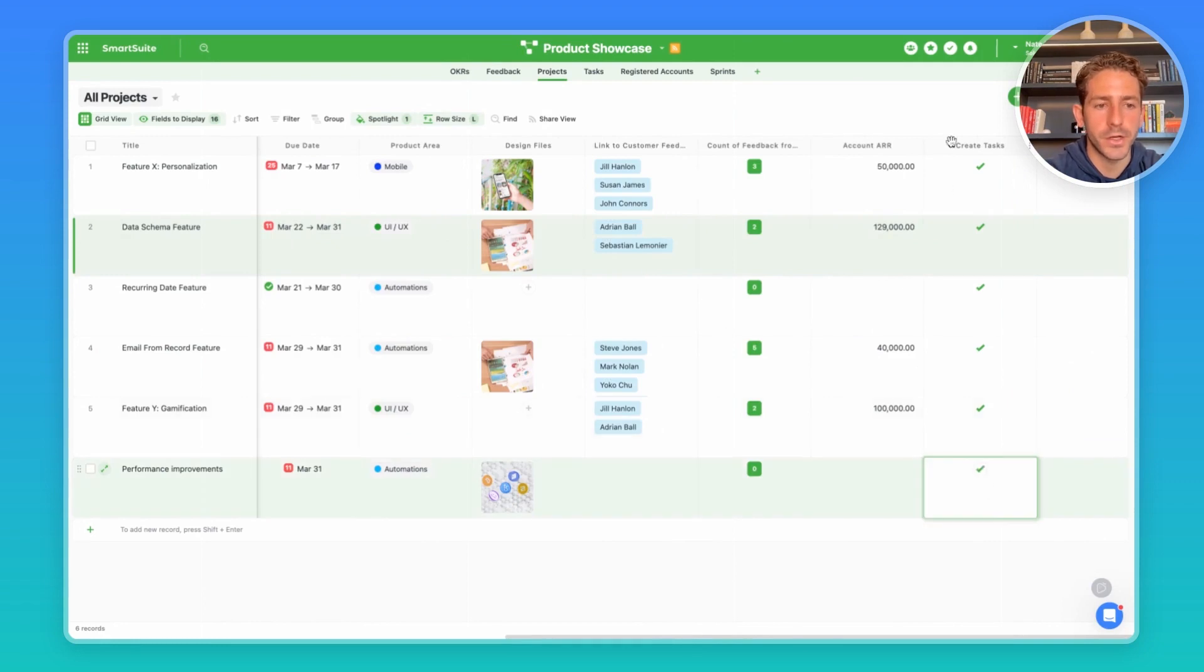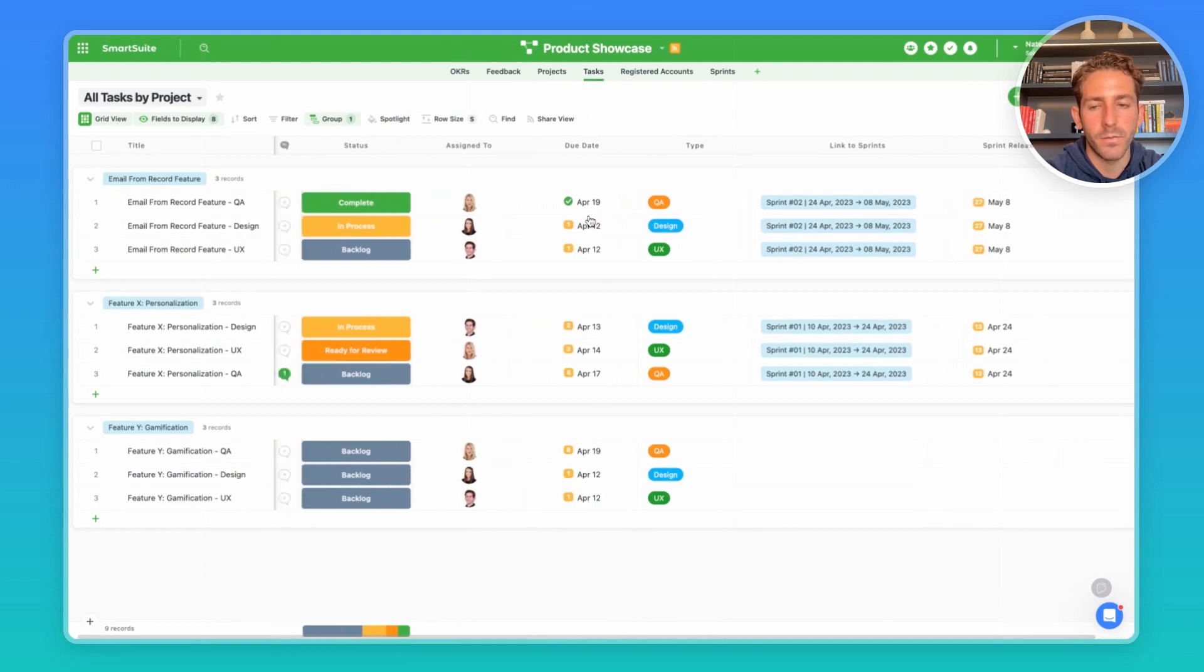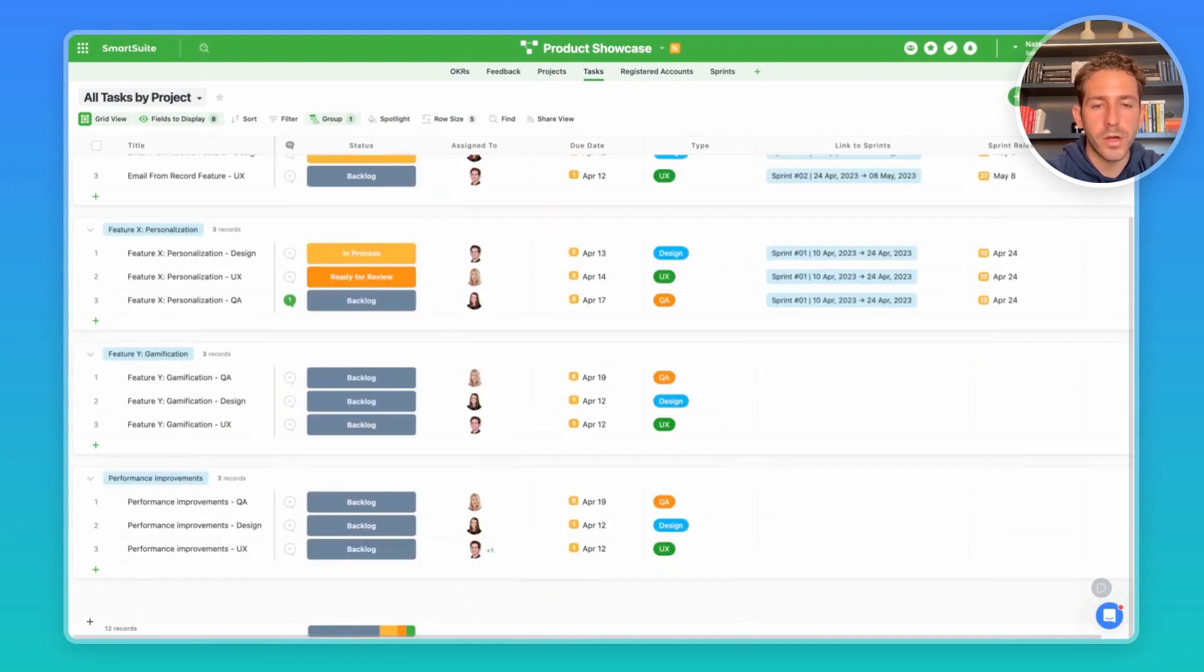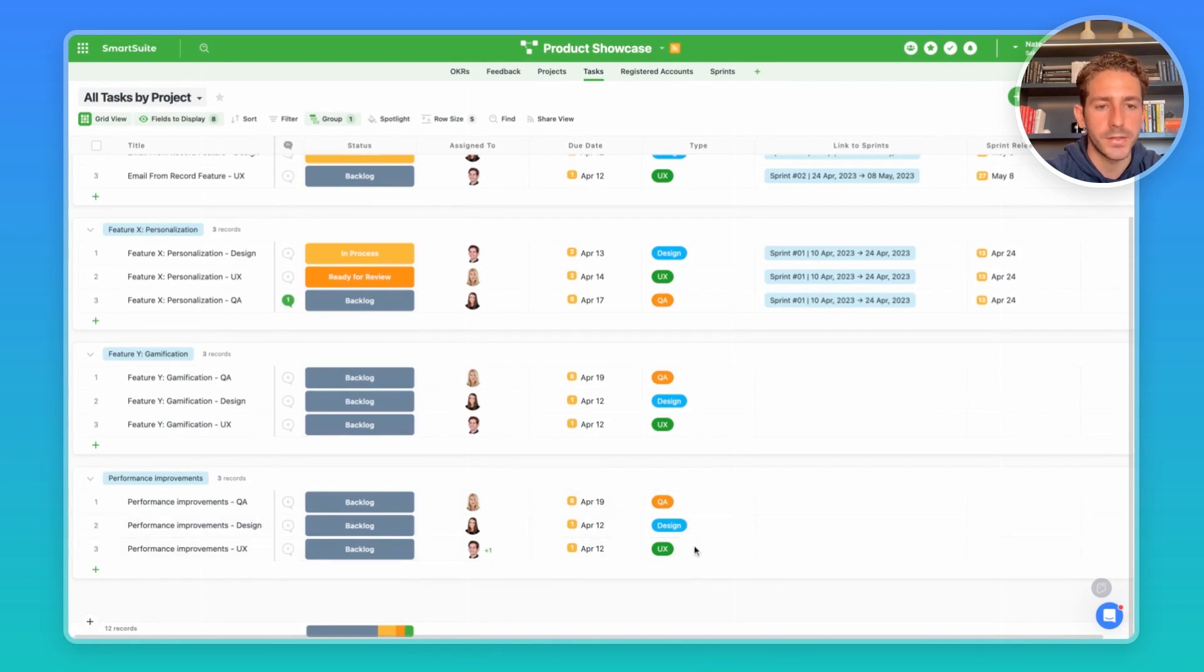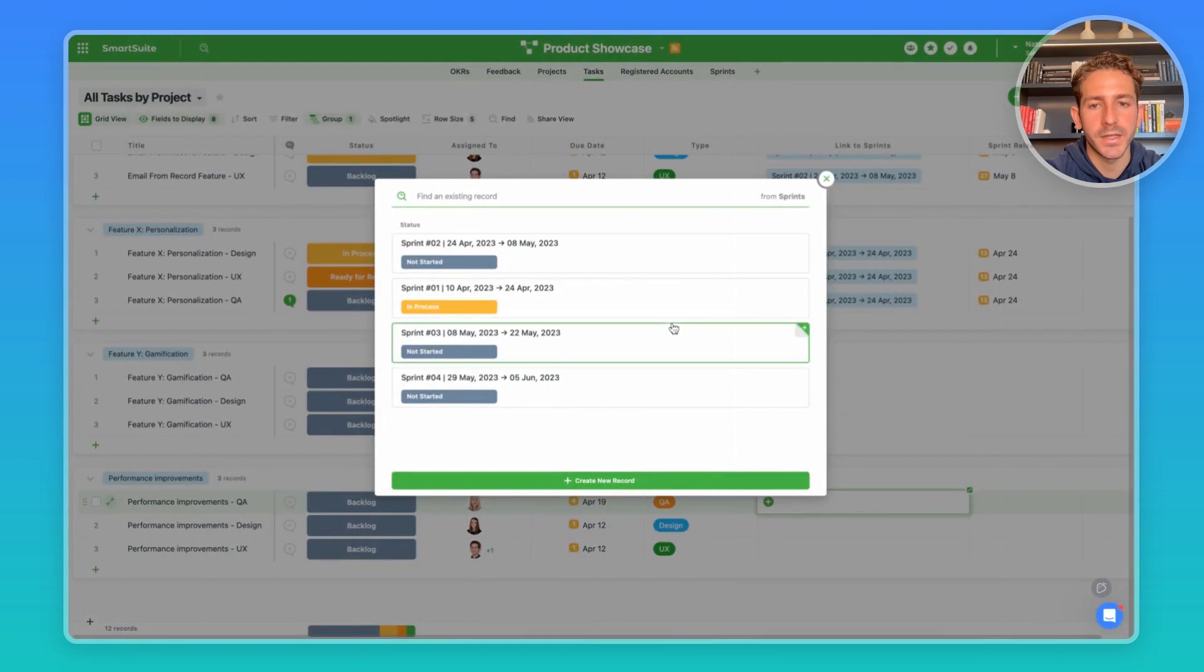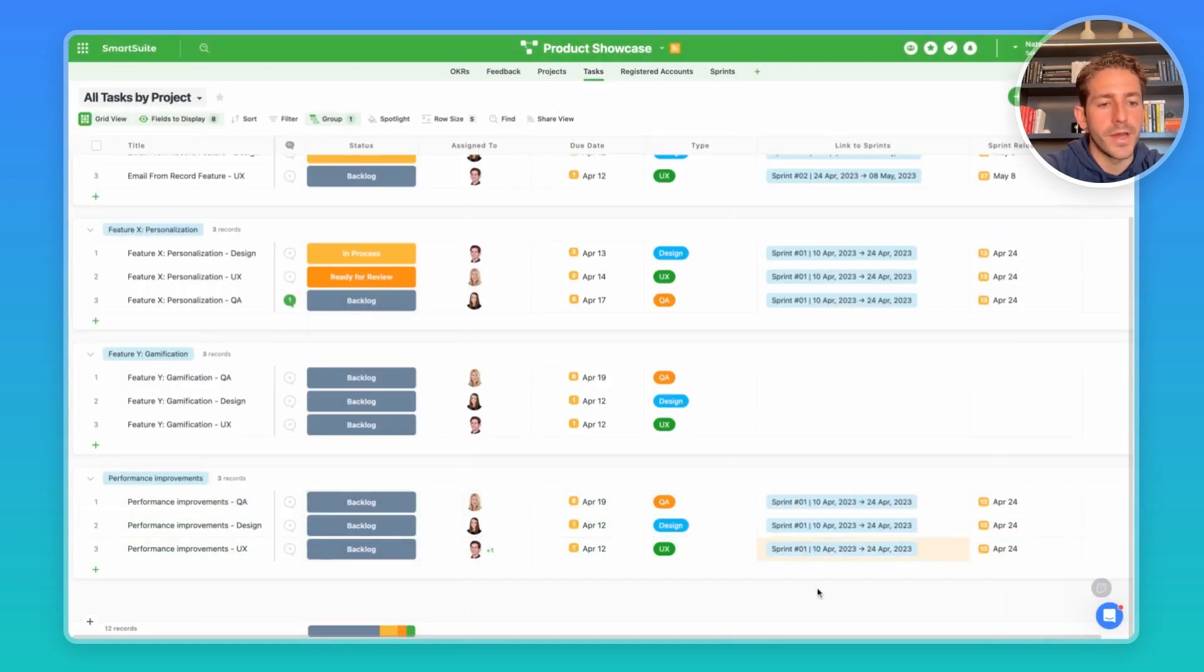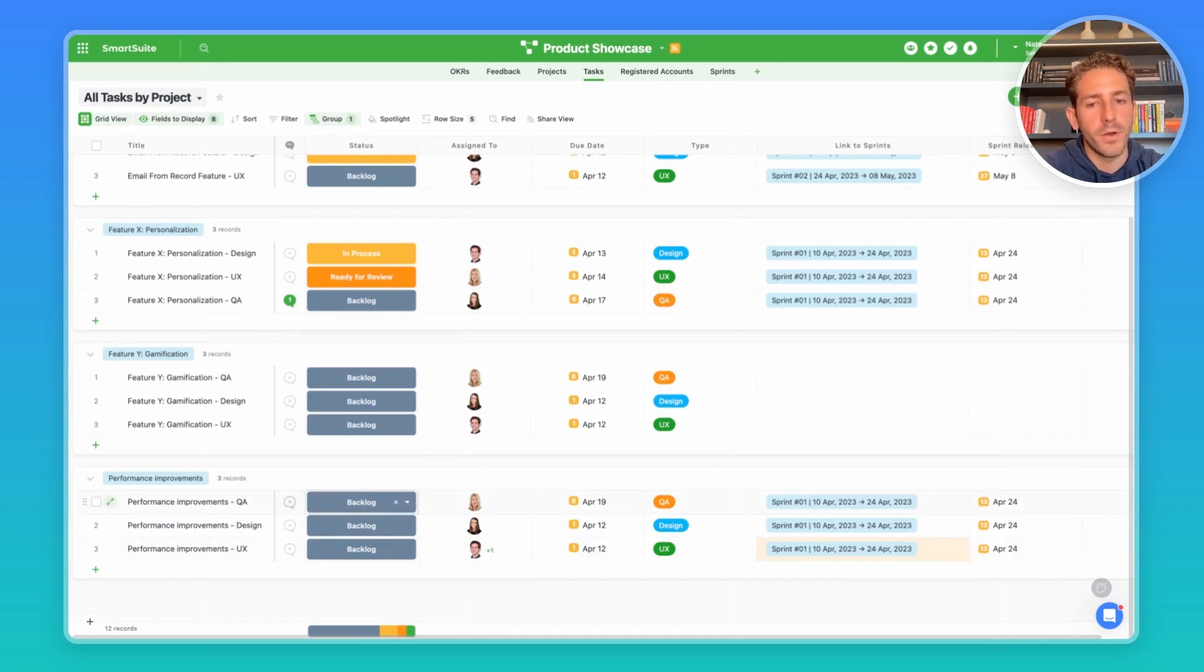And when you move back over to the tasks we can see records being created related to that project, assigning the relevant party based on the type of task it is. And a product lead could go into each of these tasks and assign them to a specific sprint which would then populate the sprint release date so that the owners of these tasks know when this task needs to be prioritized and completed.